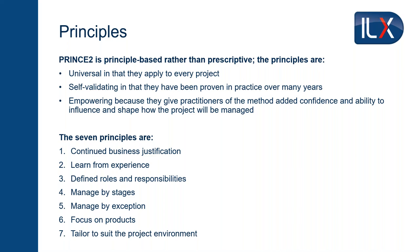Focus on the product: what is the endpoint, what are we delivering? Has it been clearly defined? Do we know what we're going to do? We can do this at both the high level of the project and the detail level, so when we delegate work there's a clear expectation of what's going to be delivered. It allows us to check — have I actually finished? If we run a test, have we delivered what was asked for? For example, if the task is bricklaying, let's define the length, height, and width of the wall — then we can estimate how much work is necessary and see what we're going to do.